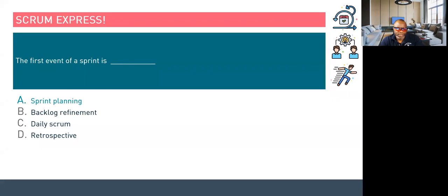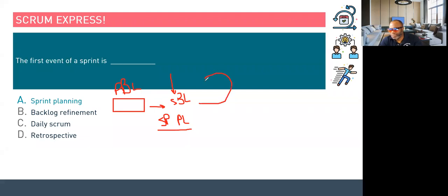The Scrum skeleton is going to start off with your product backlog, okay? And then your product backlog, you're going to whittle that down into a sprint backlog for the sprint, but that happens within sprint planning. Okay, so where sprint planning happens, that's where your sprint backlog is being derived from your product backlog. And then you go into the actual 24-hour cycles, the sprint. Just remember that the sprint is actually a container for all the ceremonies, really. But the first ceremony is sprint planning.